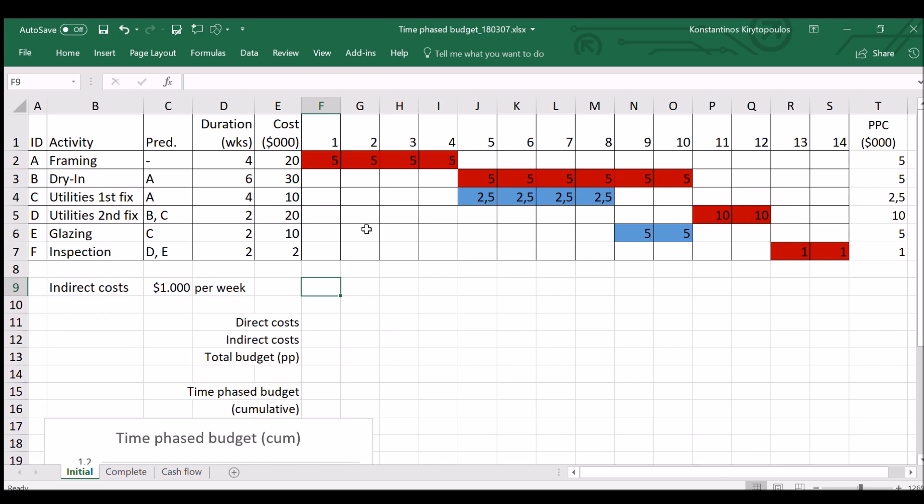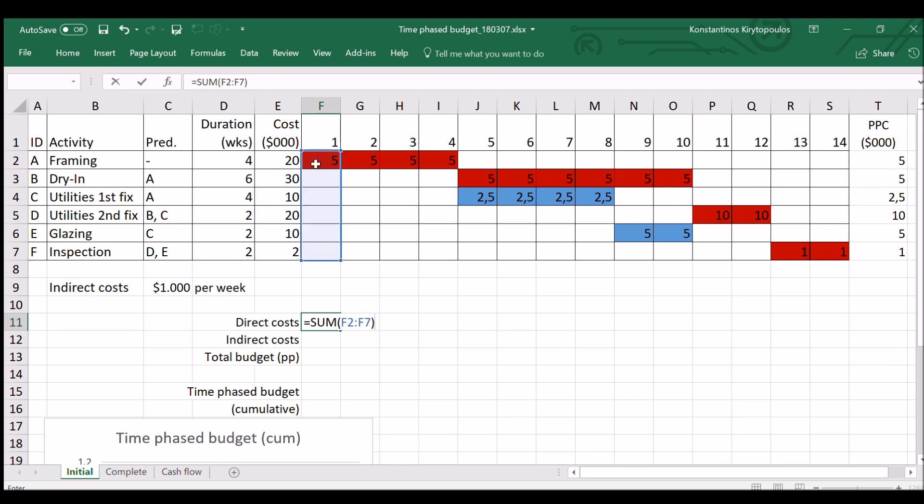So in this case, we have an indirect cost which is $1,000 per week. The first thing that we can do now is for each week to sum the direct costs existing. And that would be the sum of all the costs happening during week one. In this case, we only have activity A happening in week one, so the only direct cost would be the one from activity A.